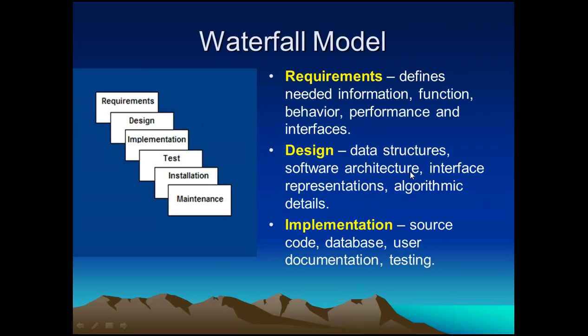Once the requirements have been finalized, this phase can be frozen. After freezing the requirement phase, only then are you going to start design. Suppose you planned 1 month for requirement analysis. Okay, you planned 30 days, but after 25 days you realize that a few more days are required, because requirement analysis is not completed due to some other issues.